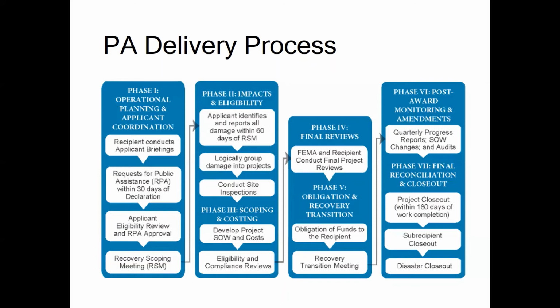Once your RPA is approved and your organization has been determined to be an eligible applicant, HSCMD coordinates a pre-award risk assessment. Our staff work with applicants to review agency capacity, policies, and procedures. This includes reviewing written procurement policies and their compliance with federal requirements. The results of the risk assessment inform HSCMD's monitoring activities during the disaster. At this time, HSCMD also initiates the funding agreement, which is completed in EM Grants Pro. Funds for obligated projects cannot be released until the funding agreement is complete. Agreements are required to be electronically signed in EM Grants Pro.